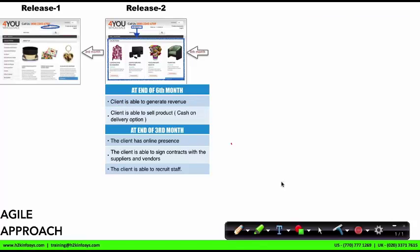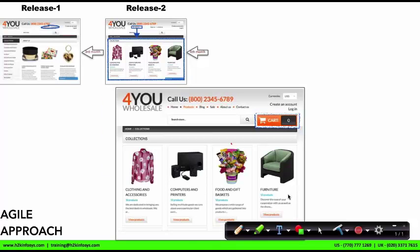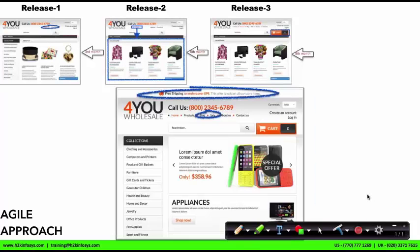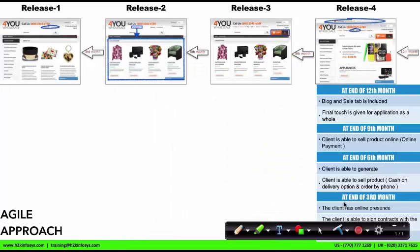Next, again to add early value to the business, I commit to the client to deliver an add to cart feature and online payment facility, which allows the customer to purchase the product with online payment by the end of the ninth month. Let's name this release three. Lastly, I promise the client to implement good-to-have features like a blog tab, sale tab, and some finishing touches by the end of the ninth month, calling it release four and making it a complete project.